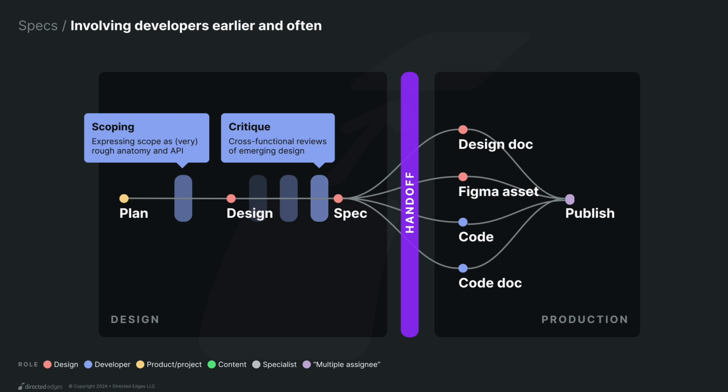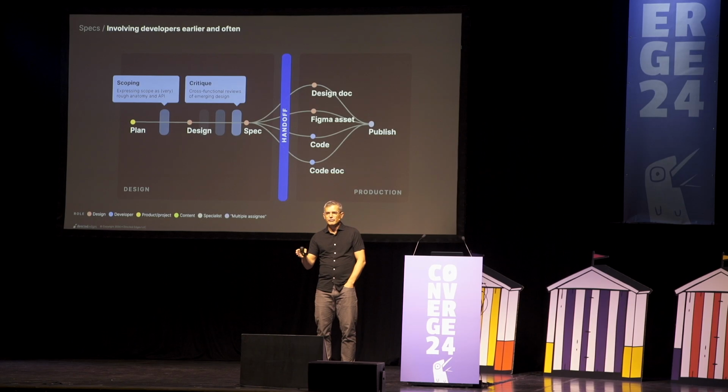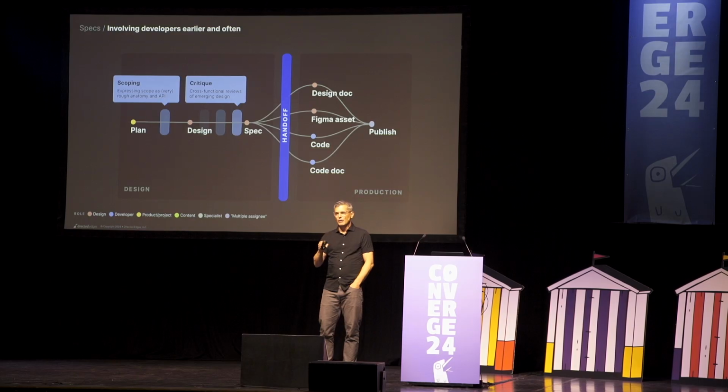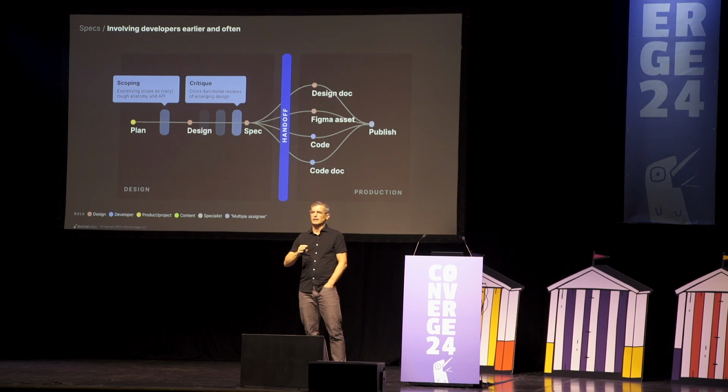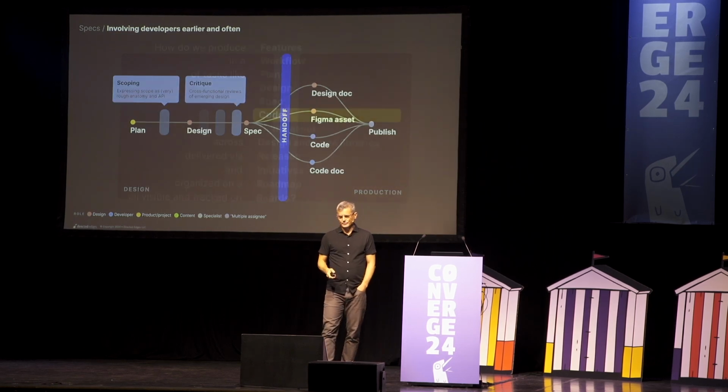And so that isn't necessarily the first time I want developers to be engaged. It's up to me from a workflow perspective to precede the handoff with involving the developers in the critique of the evolving and starting to solidify design. If not, actually, I require a developer to be in that planning session when we're 30 to 60 minutes talking through an Asana task, to make sure that we have a decent, very low, drafty kind of sense of where we're going to go with this thing, so that they can also have an influence on where the scope is going to go.